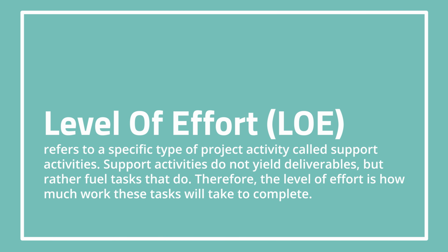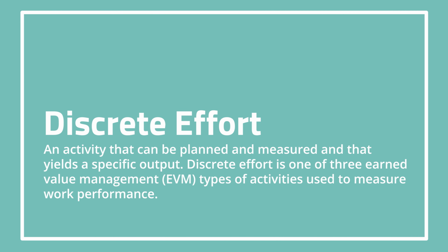Now, when we talk about time and cost associated with time, we also have to talk about the effort in the project activities. First off, we have the level of effort, the LOE. These are support activities that you do as a project manager, or a team lead might do, like reporting, budgeting, and planning. And then we have discrete effort activities. That's what most of us think about when we're assigning tasks to our project team. That's discrete effort. It's effort going directly into creating the product of the project, the actual activities.